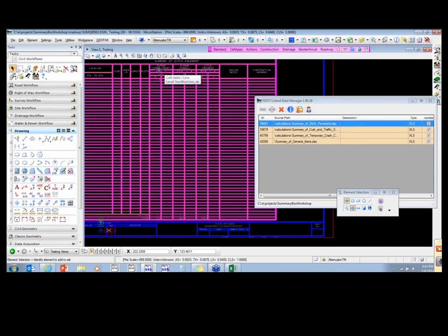The only pay item that I can think of that is designed by structures, but would go in roadway, is your walls. All wall quantities are to go in the roadway component, but the actual structures themselves and those quantities go in the structures component.